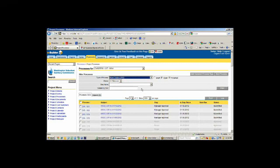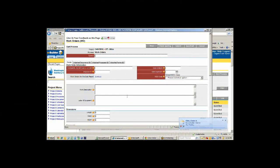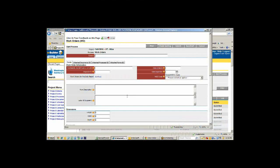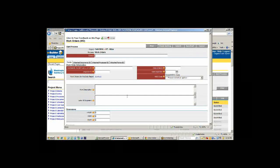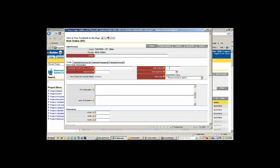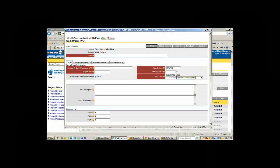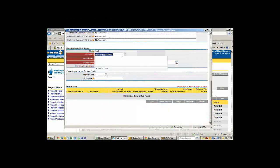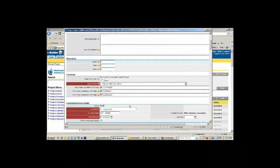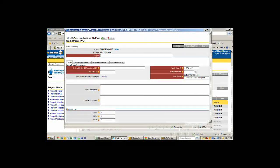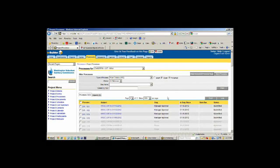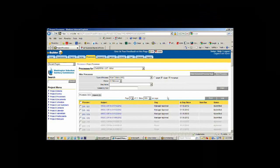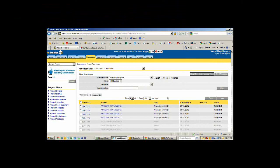What does happen is when we go through this daily report, if there's costs associated with them, it all adds up. The other way we capture costs is via work order. When we open a work order, each sewer or water job or sewer connection that we update or replace actually has a work order generated in our work order system. So by using eBuilder, we're able to capture that work order number and all the information about the work. We put in here what quantities were done for that particular work order. Then this gets submitted and approved by the contract manager. Not only do we capture those costs in eBuilder, but that work order information is automatically sent back to our mainframe work order system and that work order is updated or closed out if it's completed.